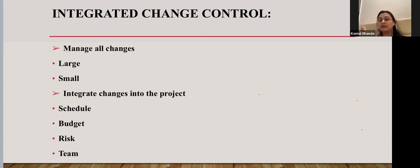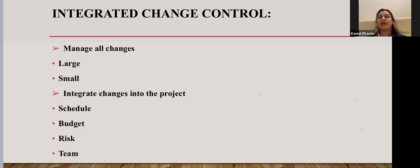When consolidated monthly, small changes together become a significant change that may require formal approvals. All changes — for any pre-approved, documented project fact — including scope, direction, and team quality — need to be documented together and integrated into the project change process.